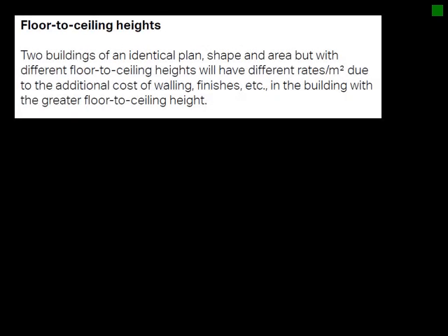Then the other thing is that I'm just going to highlight a few things that you can also look at. Your floor to ceiling height also has an influence, or your square meter rate might not always be relevant to a new building, because some buildings may have a double volume type of installation. Your floor to ceiling height might be lower or higher, which will influence the cost, etc. So it's just a discussion on that.